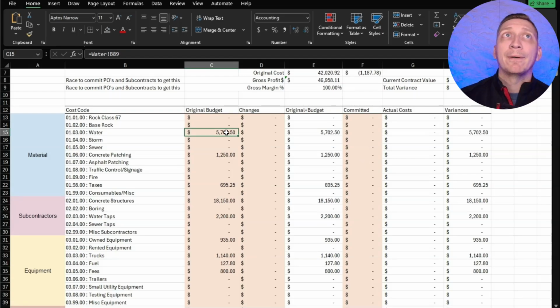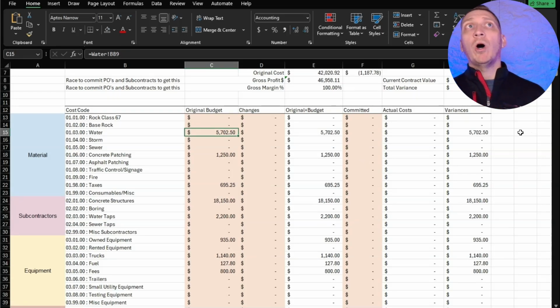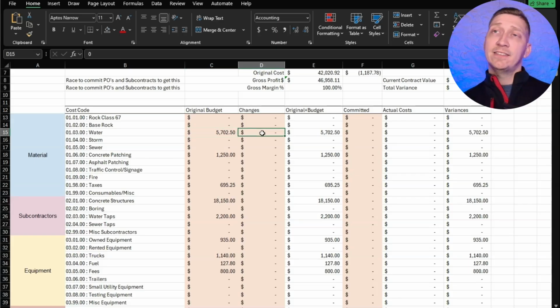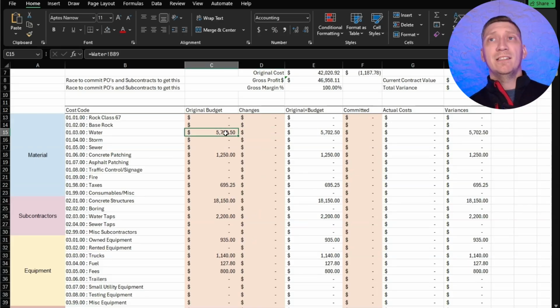So this is the hard part. How do I map what cost comes to the water material? And this is a little more vague than I'm used to doing. But this is how this client specifically wanted to track their material, because their guys in the field are the ones that cost code things. And they're not going to know, oh, this material goes toward PVC Schedule 40 or whatever, however it's listed, they're going to know, oh, I bought that for water. I bought that for storm.